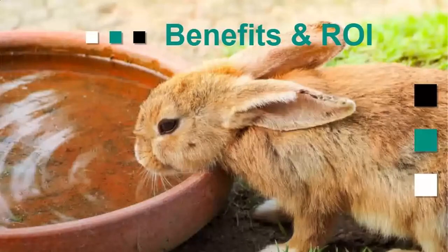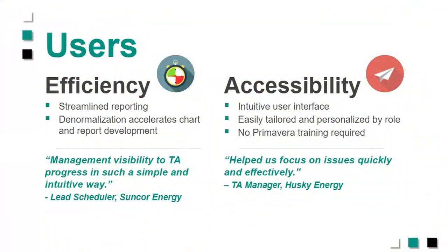Now, hopefully you saw things that made you see that it's more efficient. The snapshots are done either manually, as Marilyn showed you, or they could be done, let's say, every Friday, if that's your cutoff point. And then they auto update into the reporting engine. So it's more efficient, the visibility of the progress is so much simpler, and then you can focus on the issues more quickly.